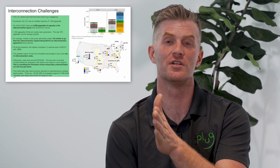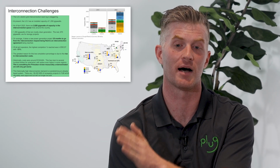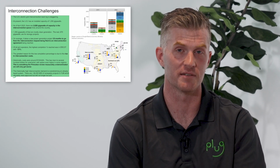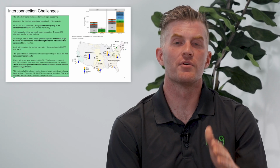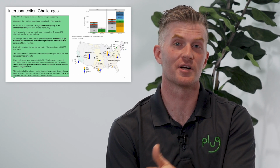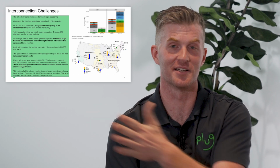And if you tie, through additionality, your hydrogen production plant to a renewable site, you create a host of problems. Not only from this interconnection component, which is also going to be getting more expensive, right? Just as time goes on, the interconnection costs are rising, but from the complexity of your projects. Right now, there's a rough estimate: if you put a project into the PJM, which is kind of this mid-Atlantic Pennsylvania region, you're not going to see power coming out until about 2030. So by requiring a production facility to be mated up to something like that, they're not going to be able to realize the production tax credit until 2030, right? Which is almost more than half of the time that this is intended to run through, first of all.